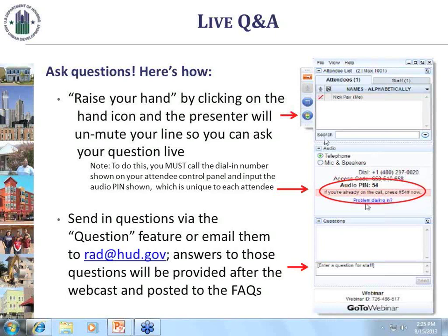And that physical condition assessment will say you've got X amount of immediate repairs you have to do, and you'll have to make sure you take care of them. But the physical condition assessment will also say to you, here's how much you need to set aside every month to pay for the windows that really got another 15 years in them, or to repaint the property in 12 years, whatever. So the PCA provider will size a replacement reserve amount for you. So you'll have to put that aside and put it into your pro forma. So in essence, it does set some standard for how much you should put in reserve in order to maintain the property over time.